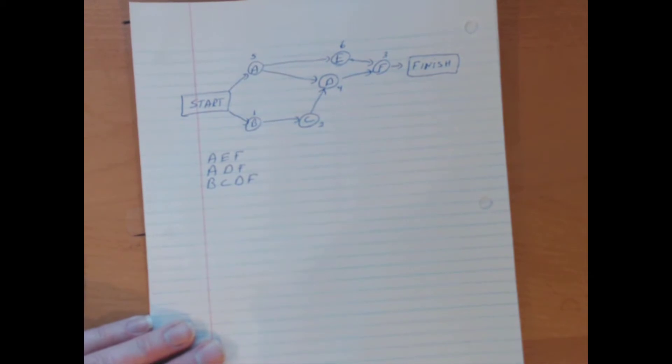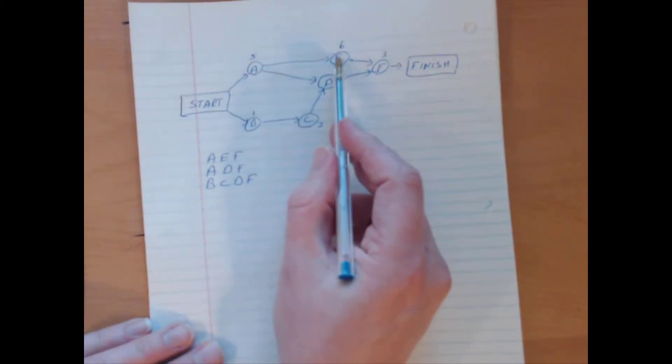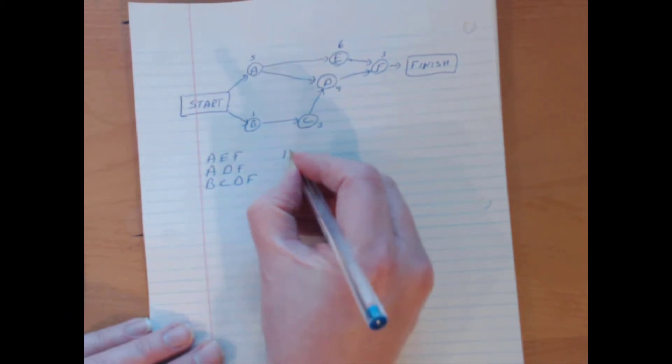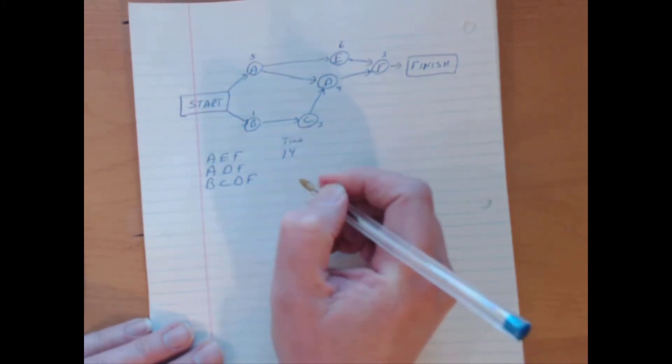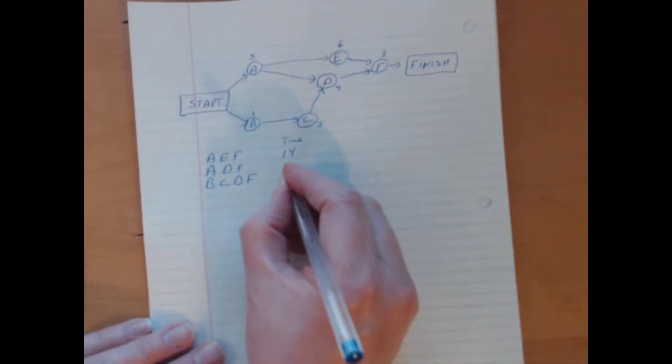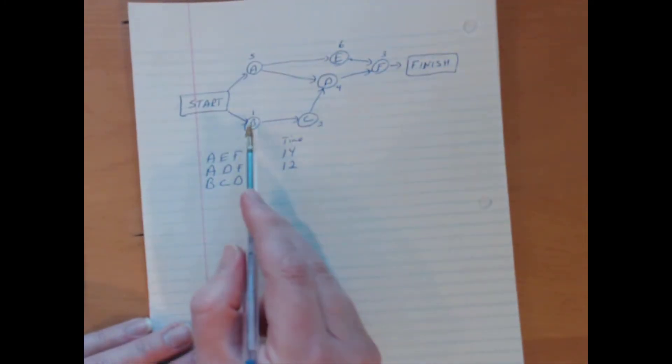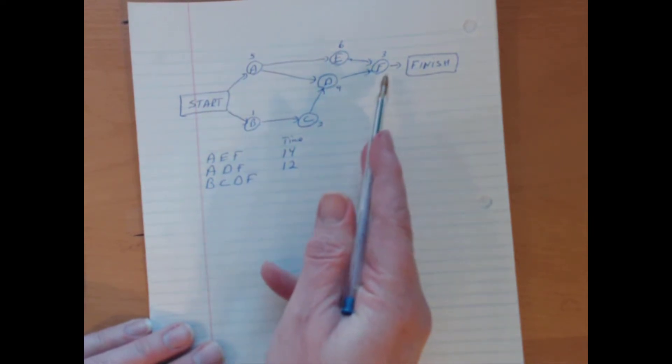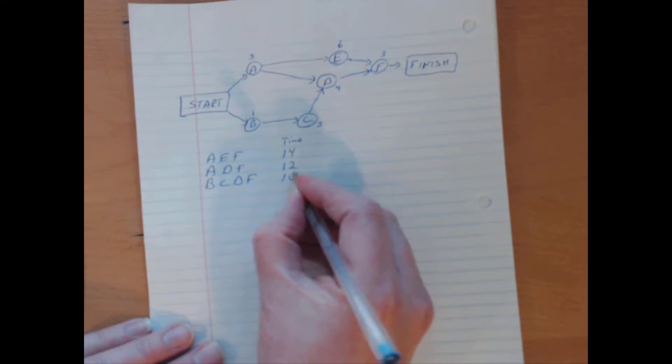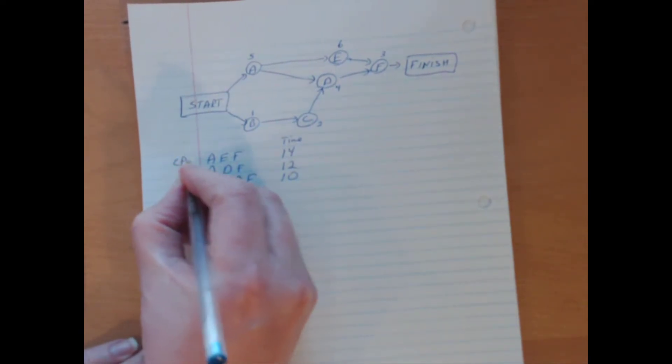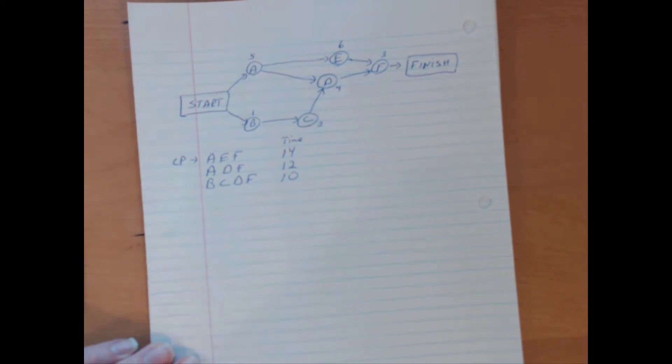And now I can count up how long A, E, F it takes. So for instance, 5 plus 6 is 11 plus 3 is 14. So I can think of time. And time in this case is in months, by the way. A, D, F. A, 5 plus 4 plus 3. And I get 12. And B, C, D, F. 1 plus 2 plus 4 plus 3. And I get 10. So clearly we can kind of see that the critical path is A, E, F. It's the path duration that's the longest. And it sets how long the entire project will take. And in this case, the estimated duration of this entire project is 14 months.